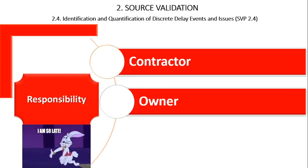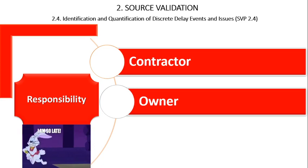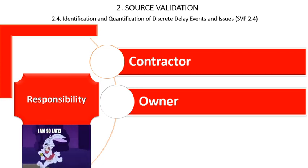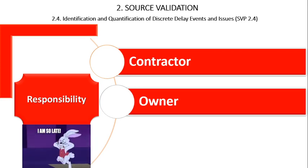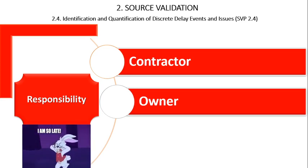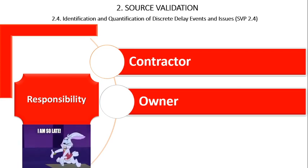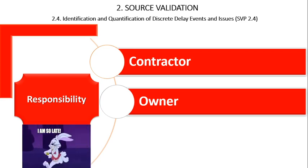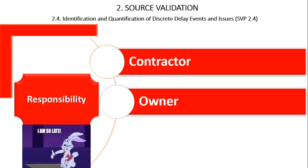Owner delay is any delay event caused by the owner, or the risk of which has been assigned solely to the owner. Examples of owner delay events include, but are not limited to: delays resulting from change orders, extended submittal review, directed suspension of work, delayed owner-furnished equipment, differing site conditions, and defective contract documents.